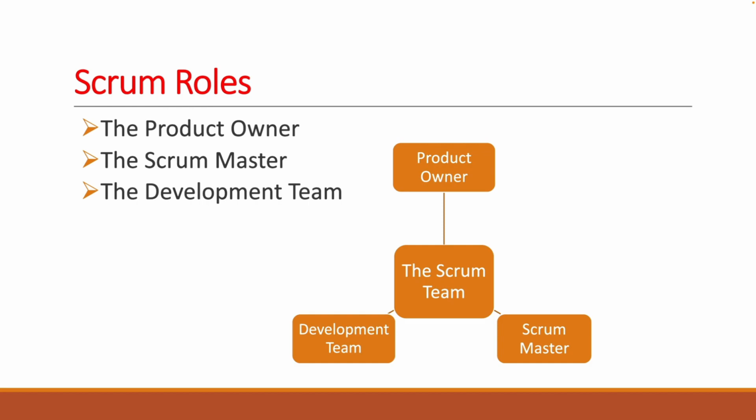The product owner is typically going into Jira to prioritize the backlog and look at the user stories. The Scrum Master is in there looking at how the sprint is progressing, looking at the reports, the burn down chart, for example. The developers are in there understanding the user story, moving things into different buckets or different statuses to say whether it's done, it's in progress, it's ready to be QA'd.